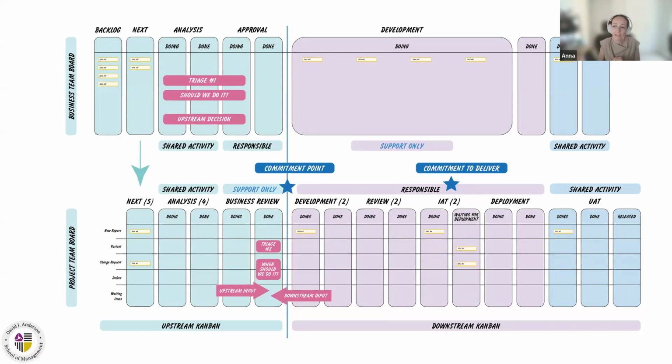What else we can see here is that this process naturally emerges from the previous team-level delivery system. This is what we call, in Kanban, scaling in width. Basically, scaling your system to the left. You add the upstream system to your previously established downstream system. So it's not that you have upstream and downstream and you glue them together. You have downstream, and then you develop it, you grow it, you mature the system by adding upstream to the left of this work.